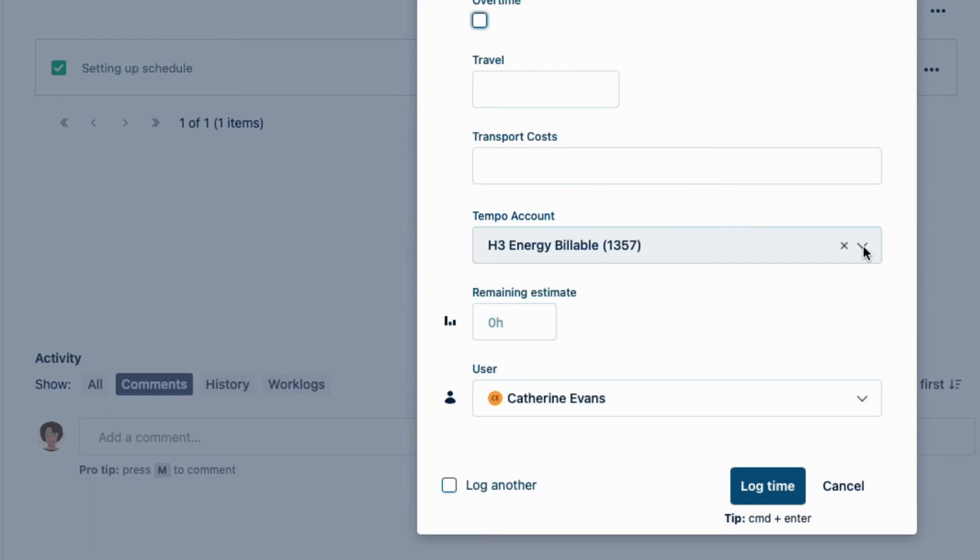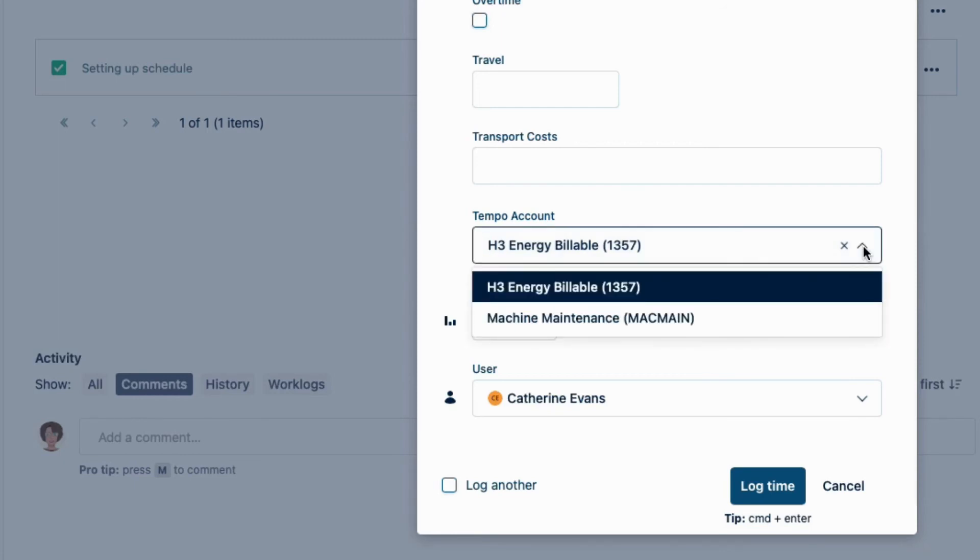It's not necessary to have this dropdown since we already have the account field in the JIRA issue. But it gives us the flexibility to easily select the account per time record. The H3 energy billable account is set because that's what I set as the default, which is great. But let's say that someone was working on this JIRA issue but was in a different department, such as our mechanics.